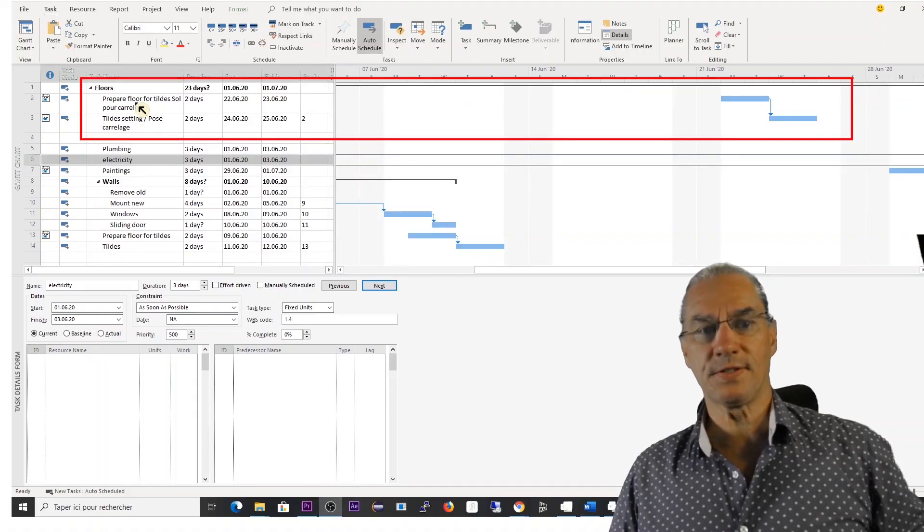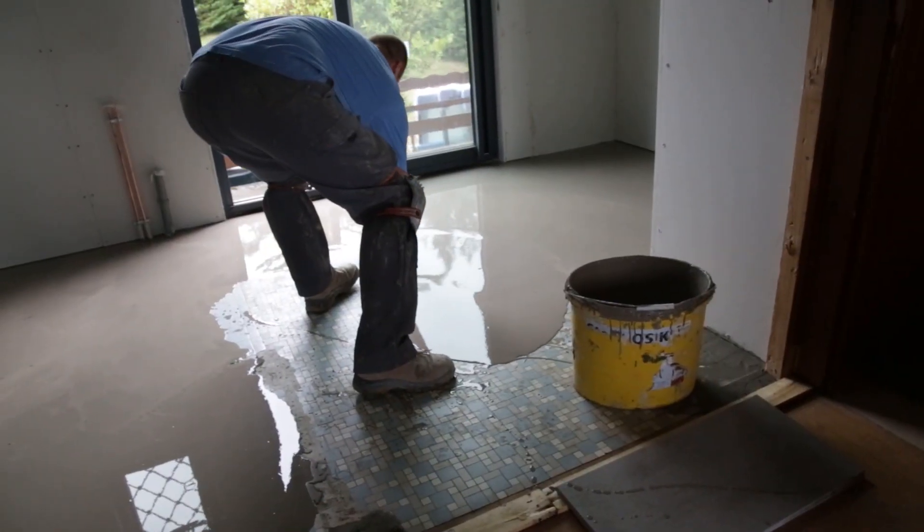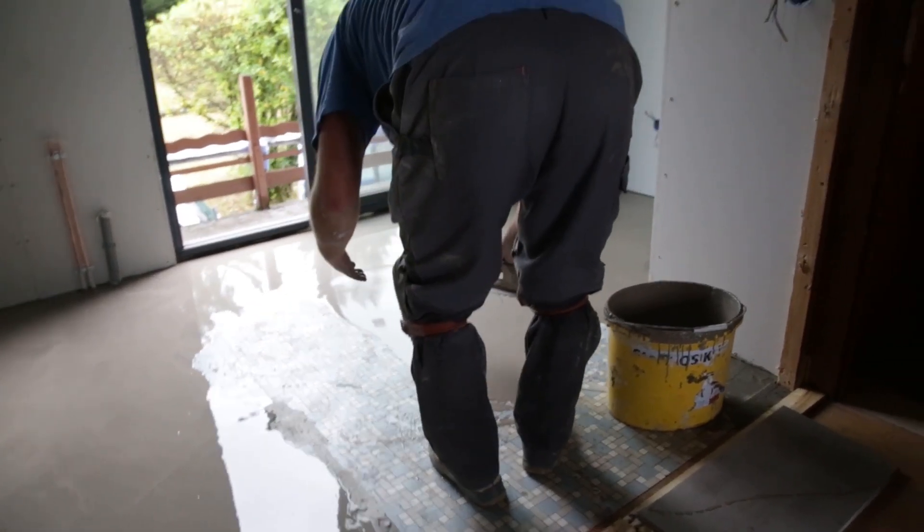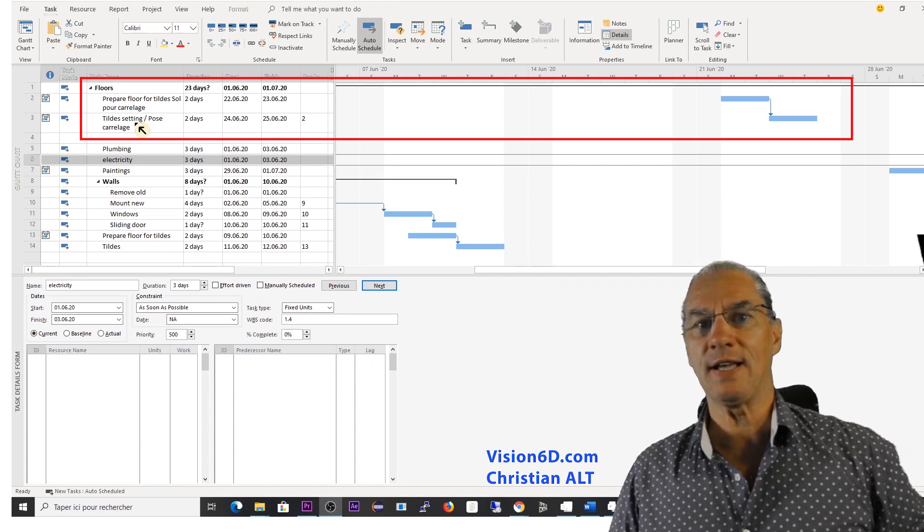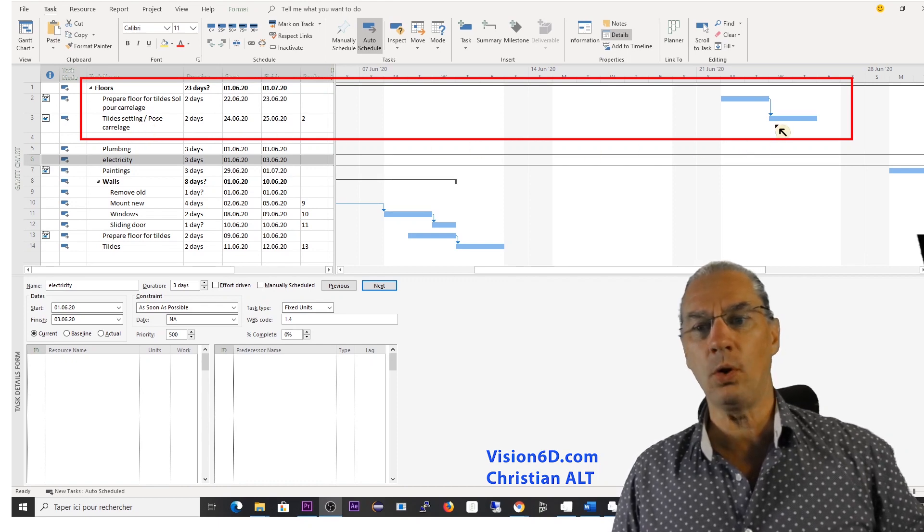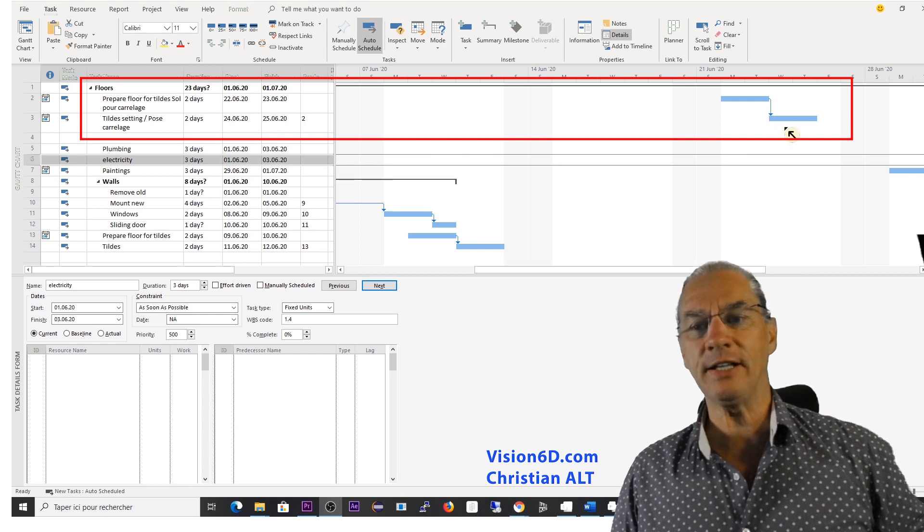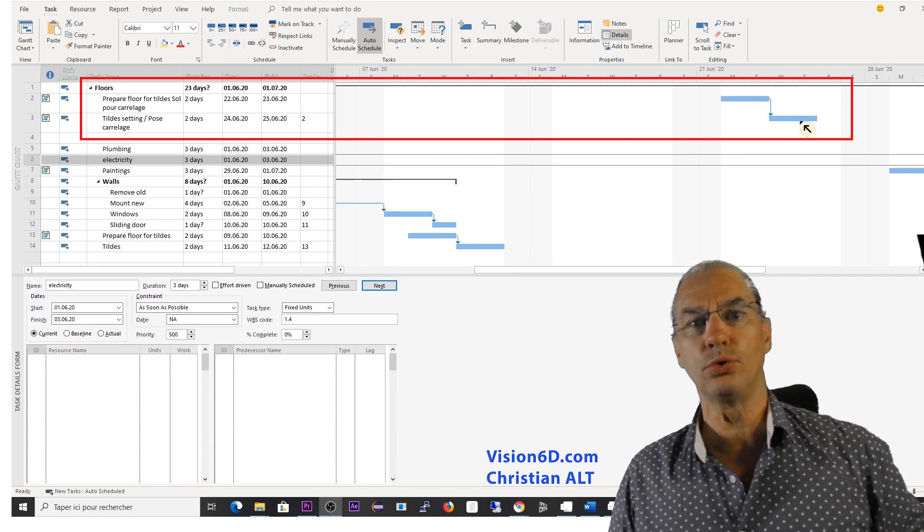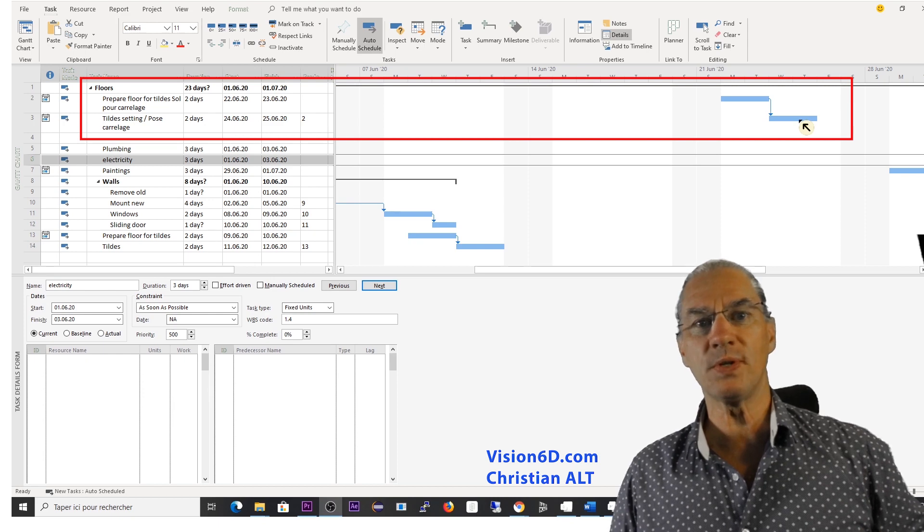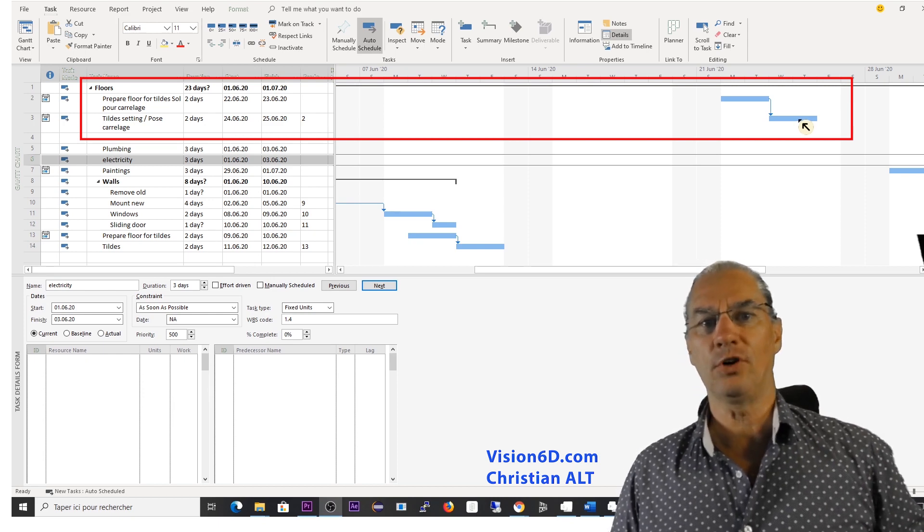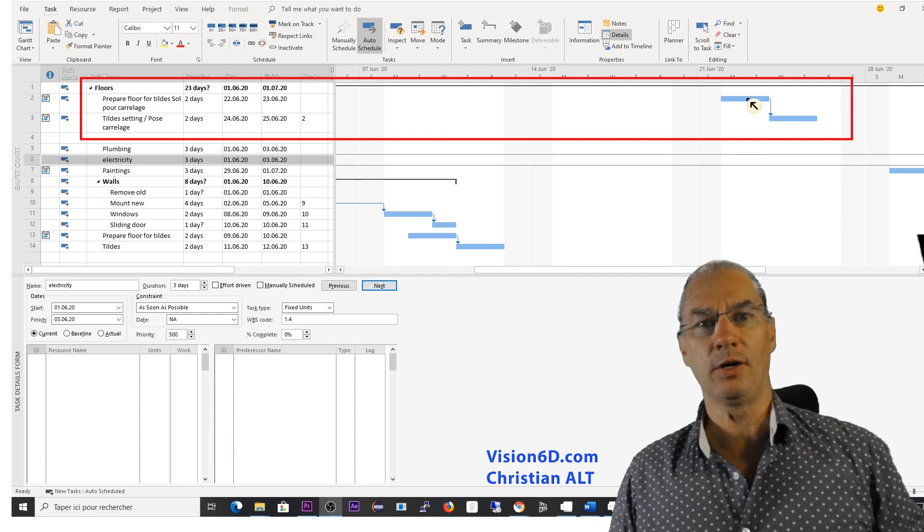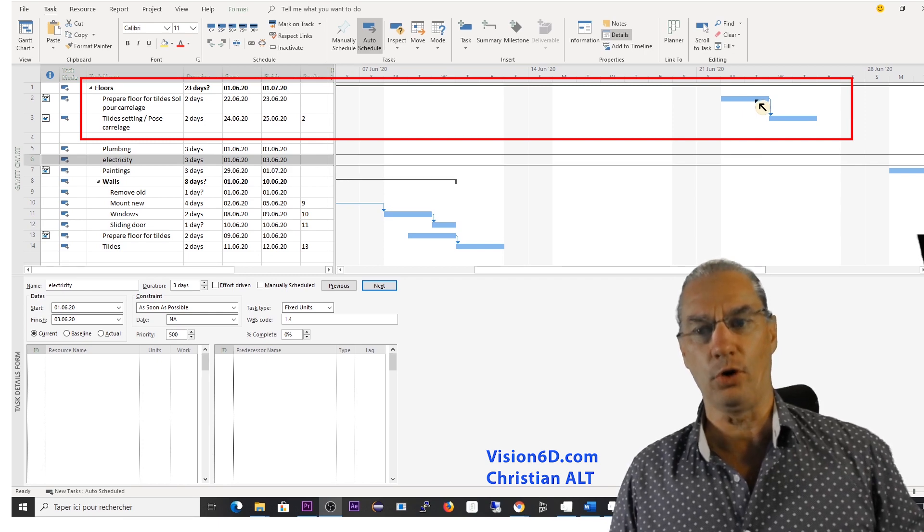We have two tasks. The first one is to prepare the floor. It's what you saw on the video. And the second one, it's the tile settings. And Alexi, when he calls me, he says that he cannot come those two days to do the tile settings. So he proposes to move one week ahead with the preparation of the floor.